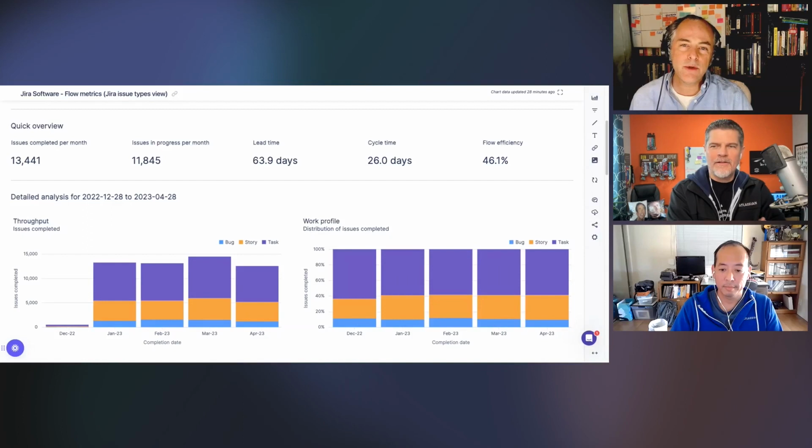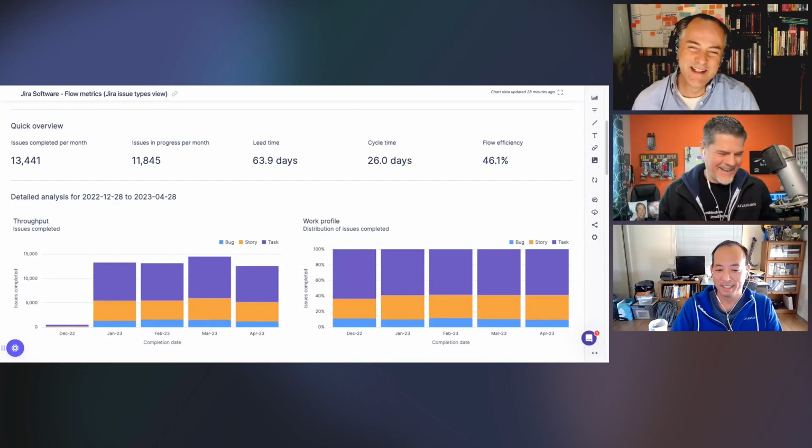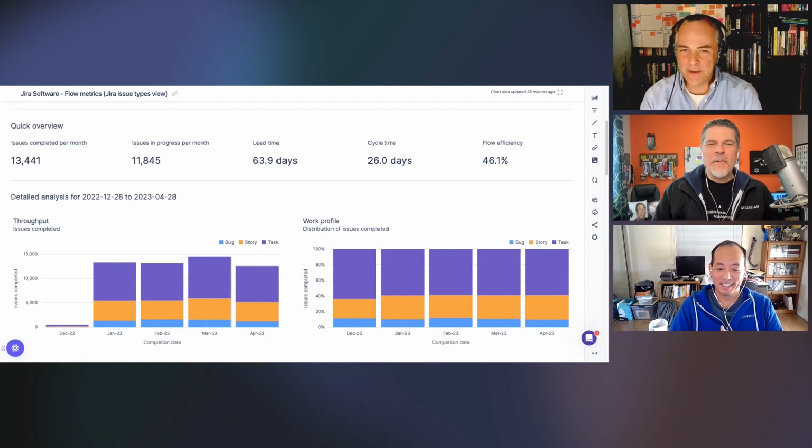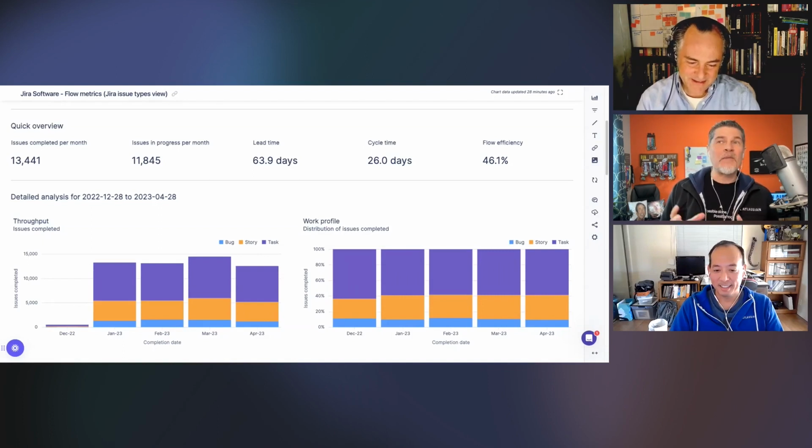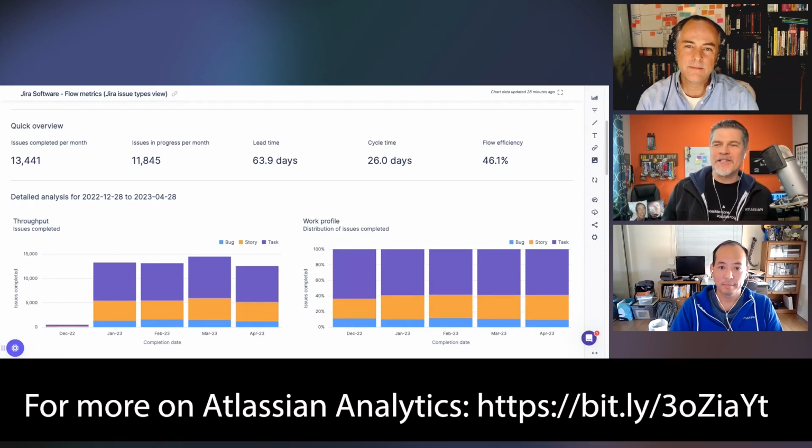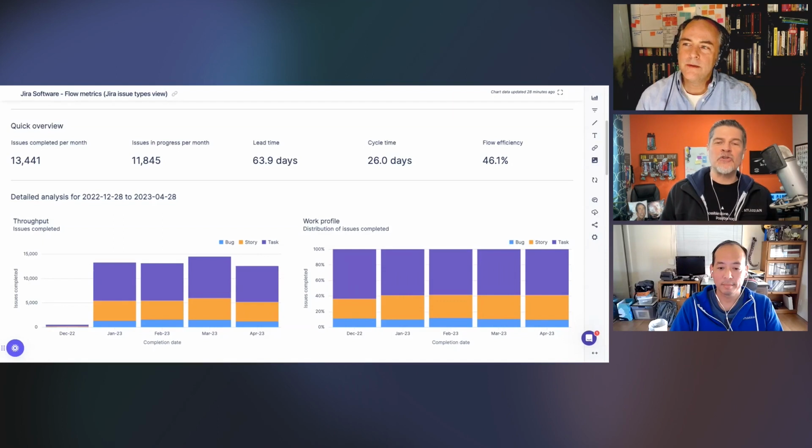It's only a problem until someone builds an AI of Troy McGinnis, and then it's fine. There you go. And what were you going to say? Sorry, I interrupted. Oh no, you mentioned Troy, and right away I'm like, right, we can visualize dependencies, and it shows you the probability, how it goes down when you have more dependencies in the system. So yeah, you're actually nailing it. It's the things that Troy talks about, where I've heard Troy mention that if you have a commitment, for every dependency that you have, it cuts in half the probability of success. So you can absolutely do that with this. You would be able to visualize. It would be kind of frightening to say, oh, within this project, I have this many dependencies. Probability of success is a fraction of 1%. Yeah. But it would be able to do that.